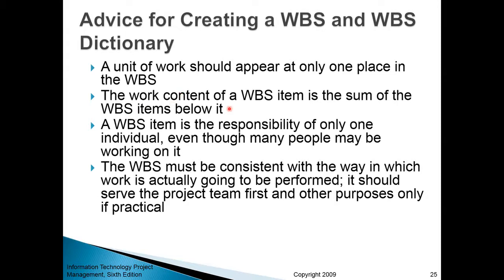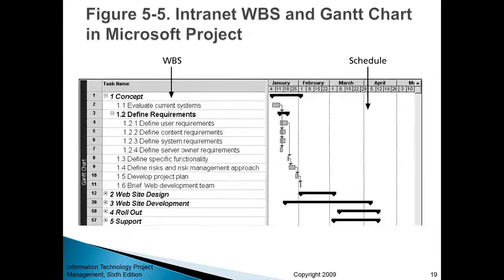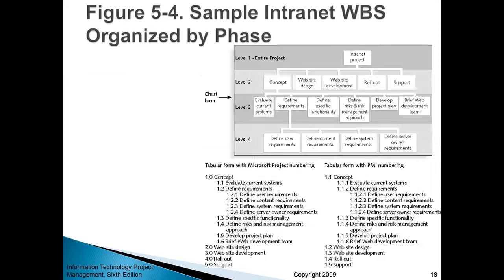The work content of a WBS item is the sum of all WBS items below it. This means that sub-items completely describe the parent item — once you deliver those sub-items, you've also accomplished the higher-level step, with nothing missing. Those sub-items are mutually exclusive — distinct and different — and collectively exhaustive, meaning they collectively describe the entire higher-order step.